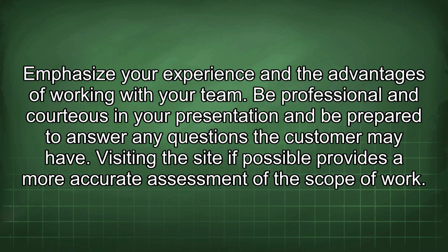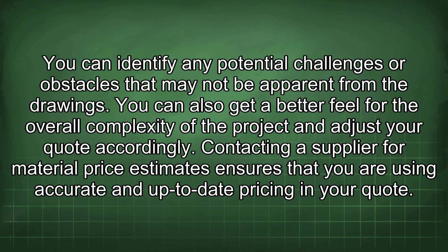Visiting the site, if possible, provides a more accurate assessment of the scope of work. You can identify any potential challenges or obstacles that may not be apparent from the drawings. You can also get a better feel for the overall complexity of the project and adjust your quote accordingly.